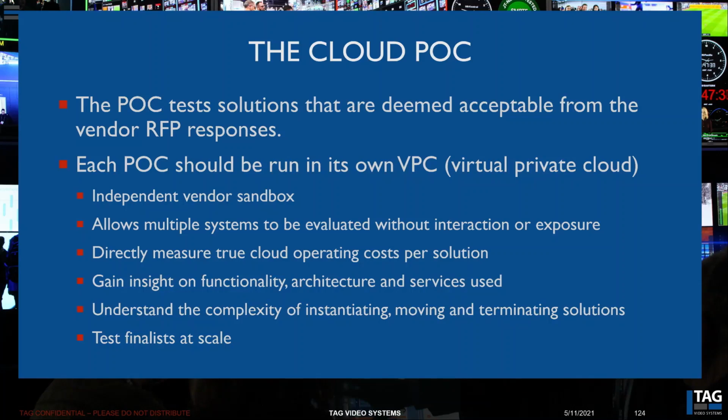And this is key. First off, it's running under your account so that you can actually measure the cost, but also so that you can run it as long as you want without the vendor absorbing that cost, because they're going to be reluctant if you ask them to pay for it. But truthfully, you want to know what those costs are. It's a small part of your final operation here. So you build independent vendor sandboxes, each with their own VPC. It allows you to evaluate multiple systems simultaneously without any interaction or exposure between them.